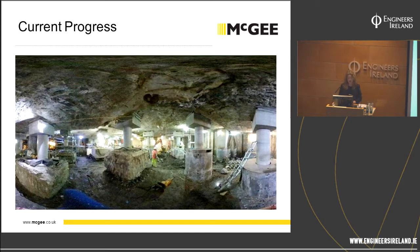We have over 60% of the building now sitting on the new column construction and have started excavating around the columns, and seen settlement of 35 millimetres across the entire site. But this has been uniform and well within the limits that were set by Arup. The monitoring itself of the building is through a liquid levelling system where a cell is placed on every column inside the building at lower ground floor, which picks up to 0.1 millimetres of movement and reports back every 15 minutes through a web-based monitoring system.